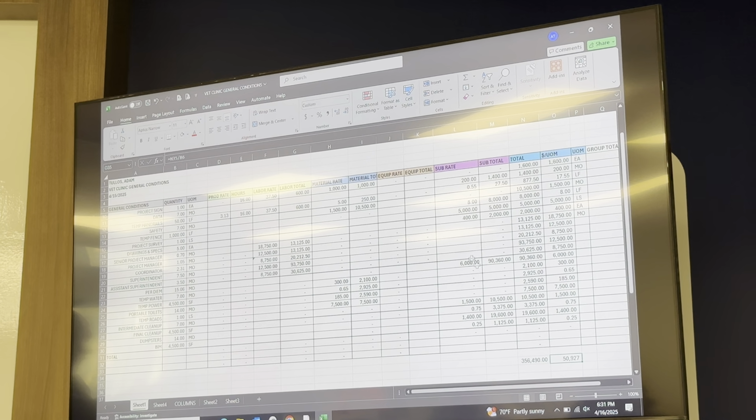A little bit on the heavy side because we have so much supervision for such a small job, which probably isn't realistic. But I want y'all to plug something in for each line item. So, I'm running around 50,000 a month. And at a high level, like we've talked about before, that's a quick benchmark: if it's a small job, medium-sized job, I'd expect to see 50,000 a month.